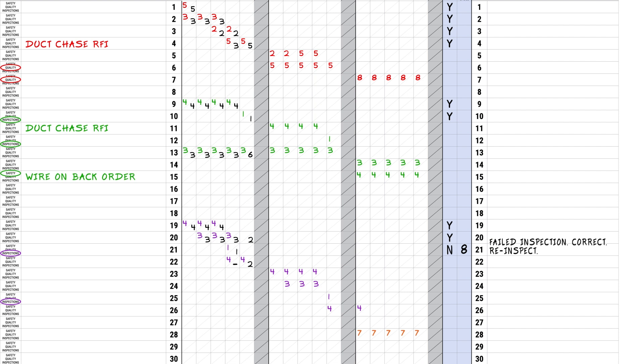In this case, you should score line 22 with a no. The root cause is manpower, so in the box next to yes/no, you should write the number two for manpower. In the reasons section for line 22, you should write the reason the task is not completed. In this case, as discussed with the team, the insulator mobilized late and did not have adequate manpower to complete. In the reason box, you should write low manpower.